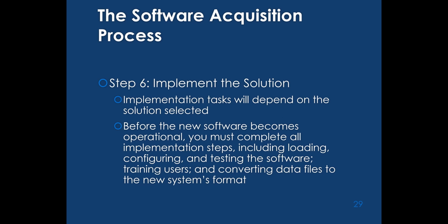But before the new software becomes operational, you must complete all implementation steps, including loading, configuring and testing software, training users, and converting data files to the new system's format.